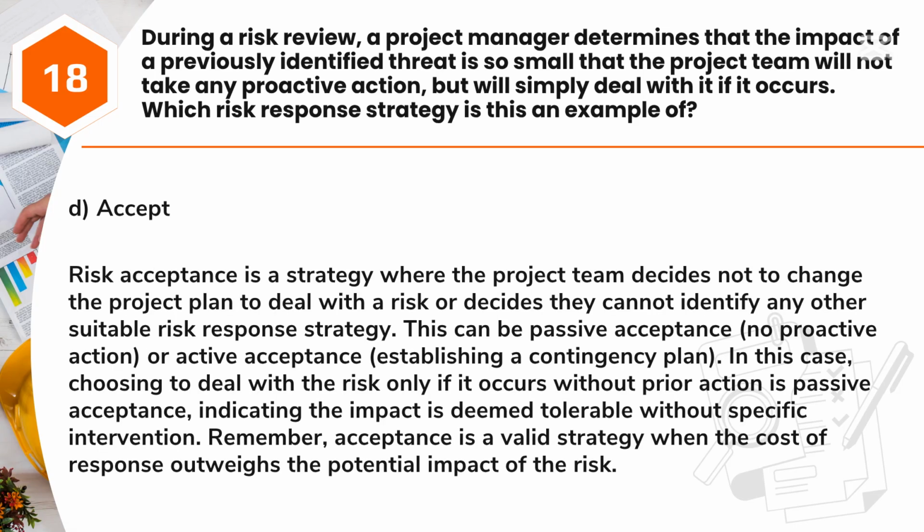Answer: D. Accept. Risk acceptance is a strategy where the project team decides not to change the project plan to deal with a risk, or decides they cannot identify any other suitable risk response strategy. This can be passive acceptance (no proactive action) or active acceptance (establishing a contingency plan). In this case, choosing to deal with the risk only if it occurs without prior action is passive acceptance, indicating the impact is deemed tolerable without specific intervention. Remember, acceptance is a valid strategy when the cost of response outweighs the potential impact of the risk.